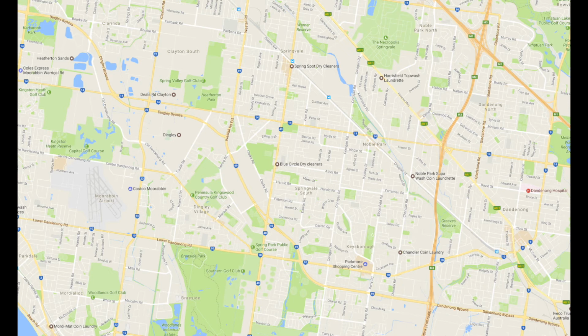In contrast, heavy rail projects are front-end capex heavy, as they are scaled with service frequency. For example, if the Rowville line were to be constructed, you can't run a section from Rowville to Waverley Park and then wait for sufficient service numbers to build up and construct the next section. This makes significant heavy rail projects difficult to get off the ground, as the upfront cost is high, and therefore risky in the eyes of bureaucrats and politicians alike.